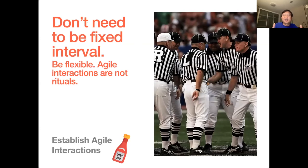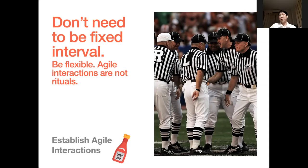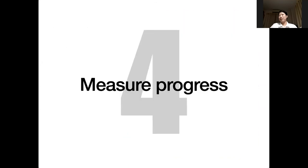Related to that: you don't need to have every interaction at a fixed interval. When you start practicing agile it's good to have rhythm so you can practice — you don't postpone the daily standup just because not everyone is there. But for other activities like the product demo, it's not worth having a demo if a key stakeholder doesn't show up — you won't get real feedback. So you might as well postpone it or make it work when you have all key stakeholders. If it doesn't make sense every sprint, create a new cadence — maybe a product demo every two sprints or monthly. That's okay. You are not sinful for not following some guy's guide.